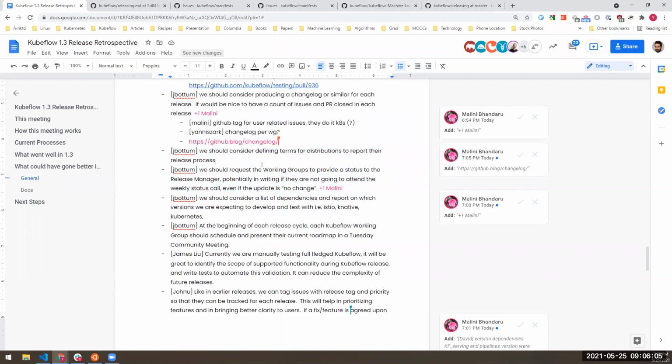I think that's very good. Yeah, in fact, in another project, what we used to do is we used to have like a joint project roadmap and say what's in, what's out, and play those games with t-shirt sizes too. I don't know this game. Oh, like it's a small feature, small, large feature means it might be broken over a few releases. That's what we mean. Like very rough estimate of how complex an issue is, like small, medium, large, extra large.